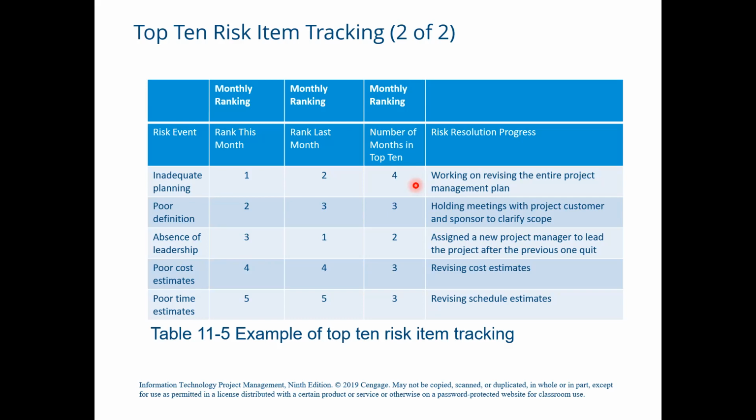So, here we are done with the qualitative risk analysis. Performing the qualitative risk analysis process helps you prioritize or rank the risks for further analysis and action. It's a systematic process to estimate the level of risk for identified and approved risks, which you did in your second process of identifying risk, and it involves estimating the probability of occurrence and consequence of occurrence and converting the results to a corresponding risk rating.